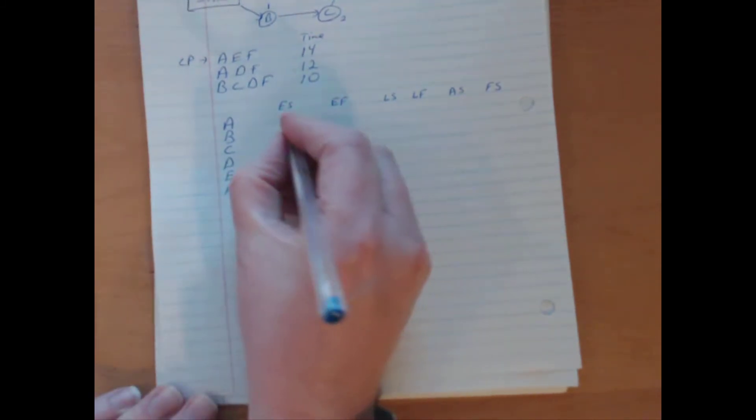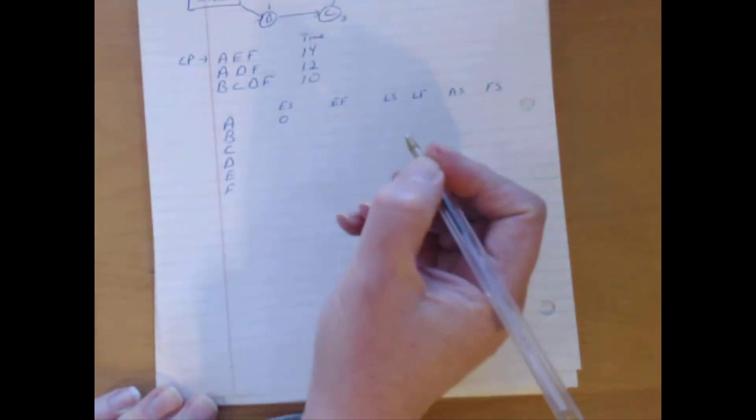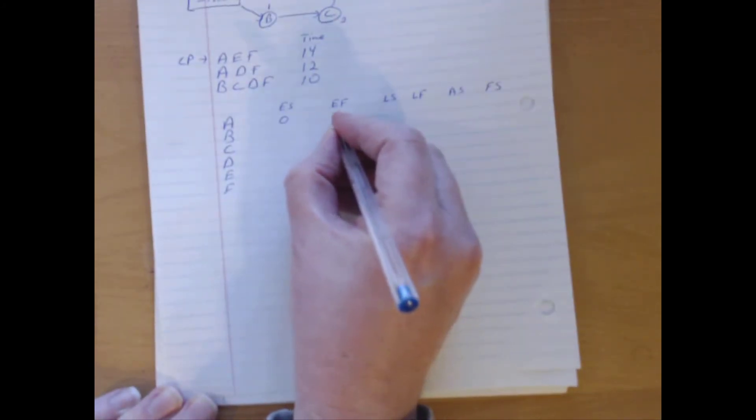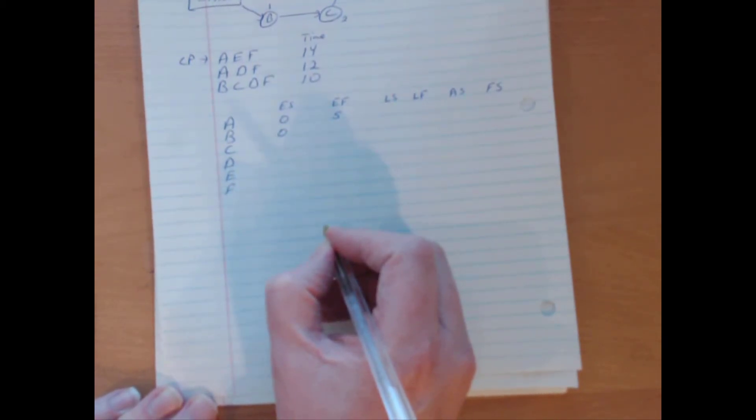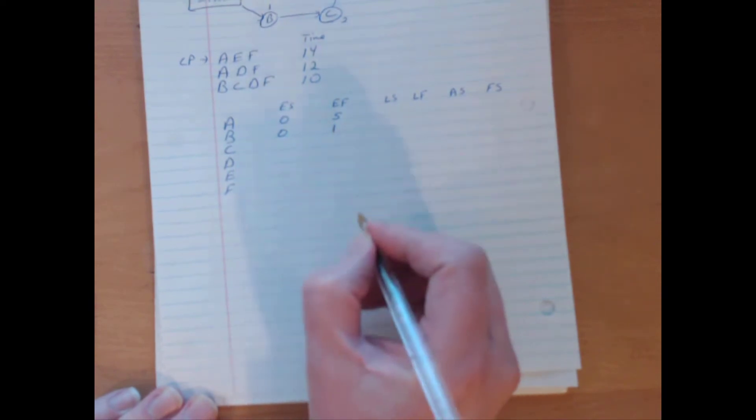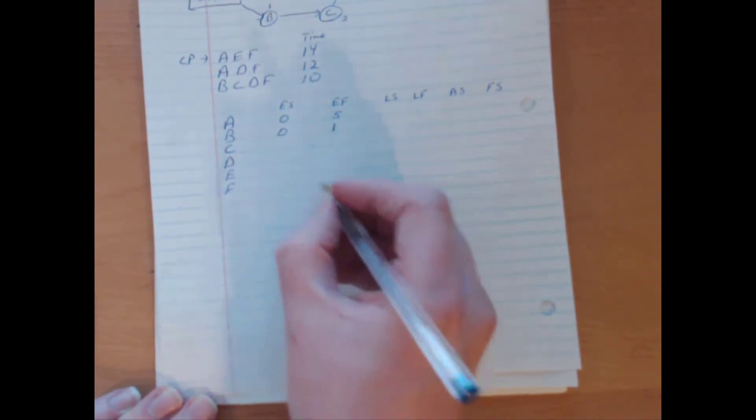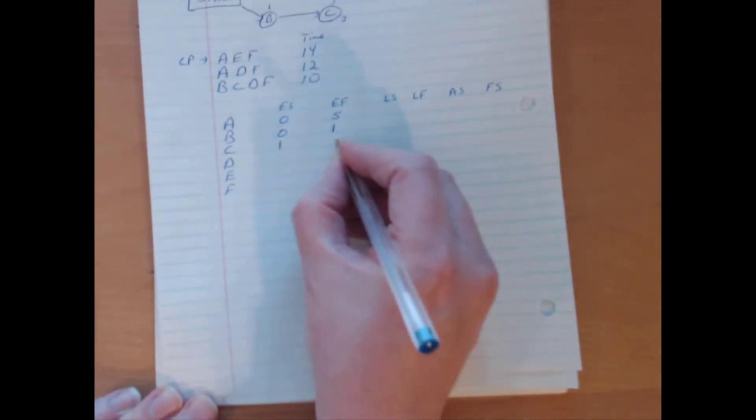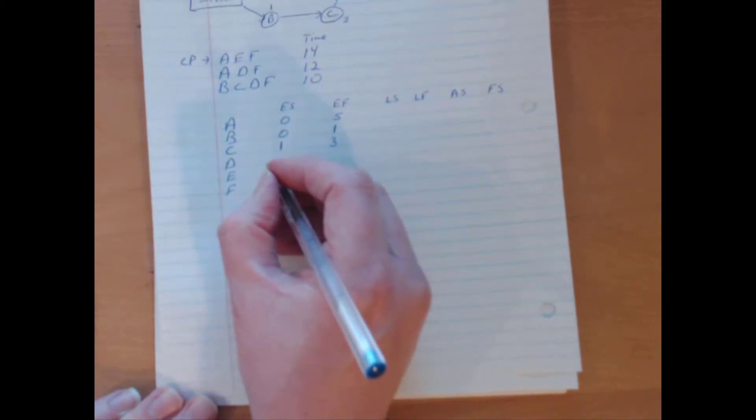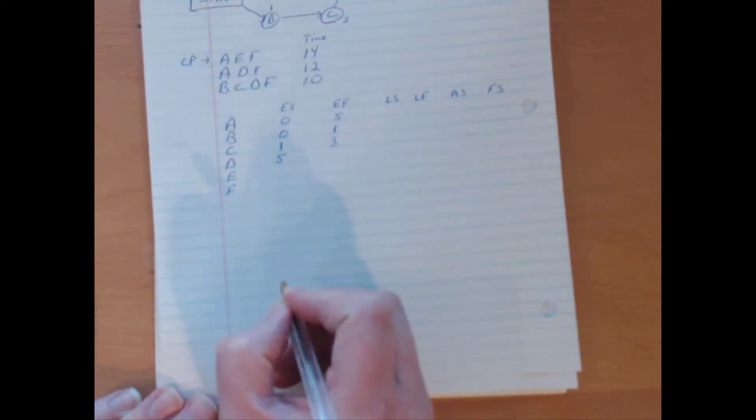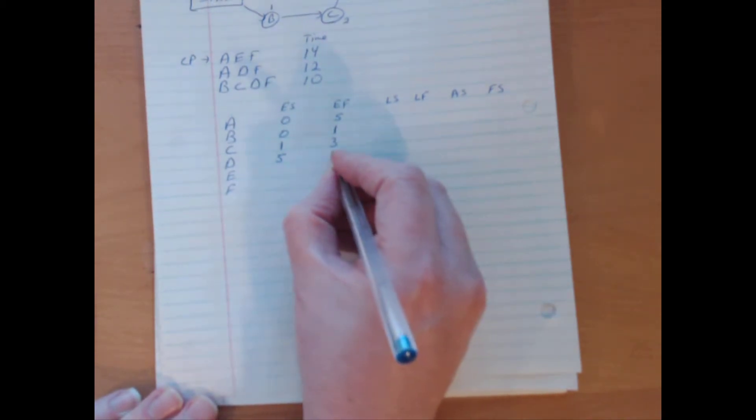So earliest start time for A, well A begins the process, so early start time for A is 0. It takes 5 months for A, so earliest finish time is 5. B also starts in period 0. So earliest start time is 0. And it finishes in period number 1. C begins when B finishes. So C can begin in period 1, takes 2 months, ends in period 3. D requires both C and A to be finished, the later of the 2. Which means that D cannot begin until period 5, when A is completed. And it takes 4 periods, so it takes until period 9, or month 9, and D is completed.